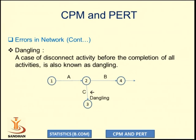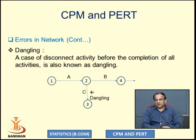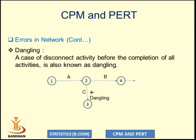The second error is called dangling. Dangling means a case of a disconnected activity before the completion of all the activities of the project. When all activities are completed but a particular activity is not connected, it is called dangling. To fix dangling, we use a dummy activity to join that disconnected activity to the completion event, thereby removing the error.